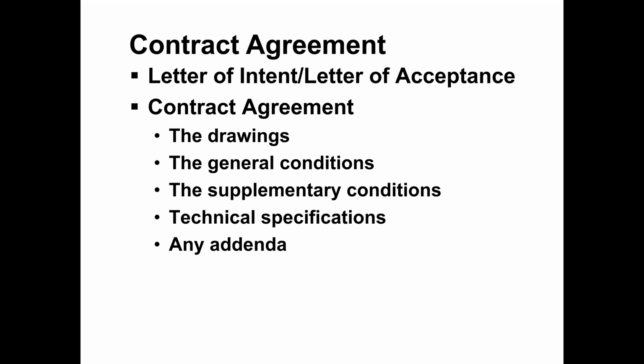Okay, so they may have issued addenda number 1, 2, 3, 4. You know that because they are issued from the first day they issued the document until bid submission. So any change in the documents will be in the form of addenda. If they have issued addenda number 1, addenda number 2, addenda number 3, all addenda will become part of the contract.